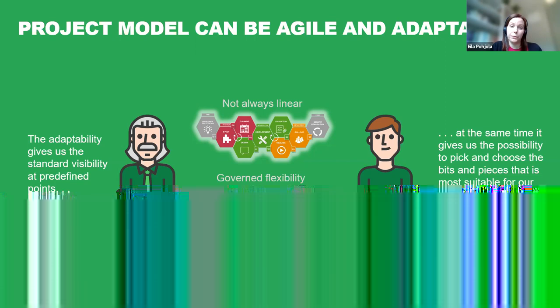As also discussed in this meeting before, we have the project organization all the time. So we haven't actually implemented any agile roles in that way. We are now trying that the project organization will do all of this. And in the next slide, I will dive even deeper. So here is one example of a release pattern, how this works. First 3 weeks implementing, and then integration testing. And after 3 weeks, there is the user acceptance testing and then the deployment.